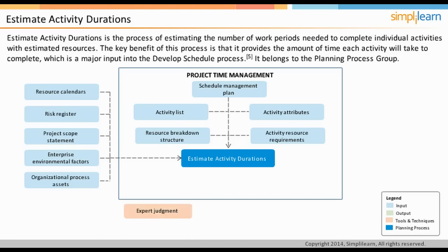First is the expert judgment, which means using previous project experiences in estimating the current project duration. This can be used with other estimation techniques and used to reconcile differences if different techniques result in different estimates. Three-point estimating is a method where 3 estimates are used instead of 1.